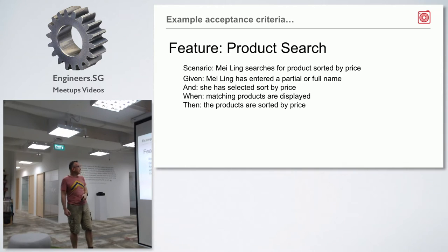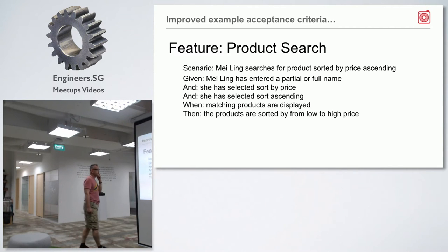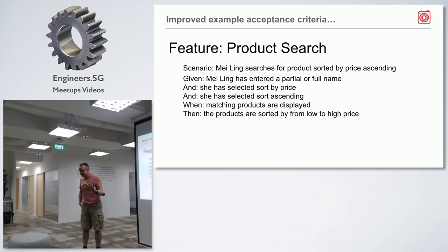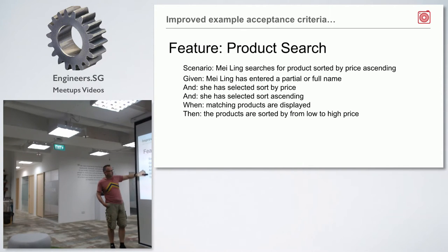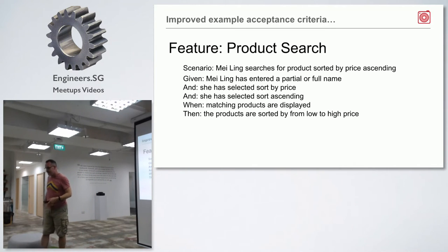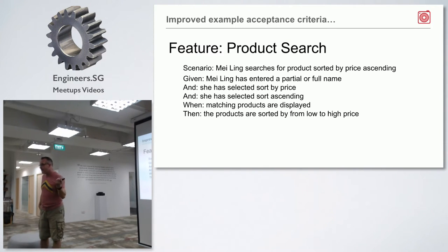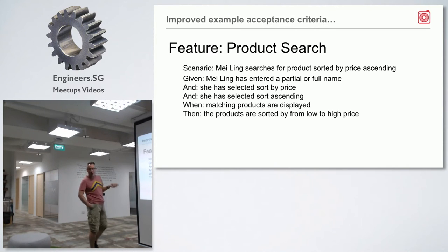Here's a refined version: Maylin searches for products sorted by price ascending. Given Maylin has entered a partial or full name, and she has selected sort by price, and she has selected sort ascending. When matching products are displayed, then the products are sorted from low to high price. That is actually a pretty good acceptance criteria. We could take this same story and come up with dozens of acceptance criteria — price ascending, price descending, and various types of searches.